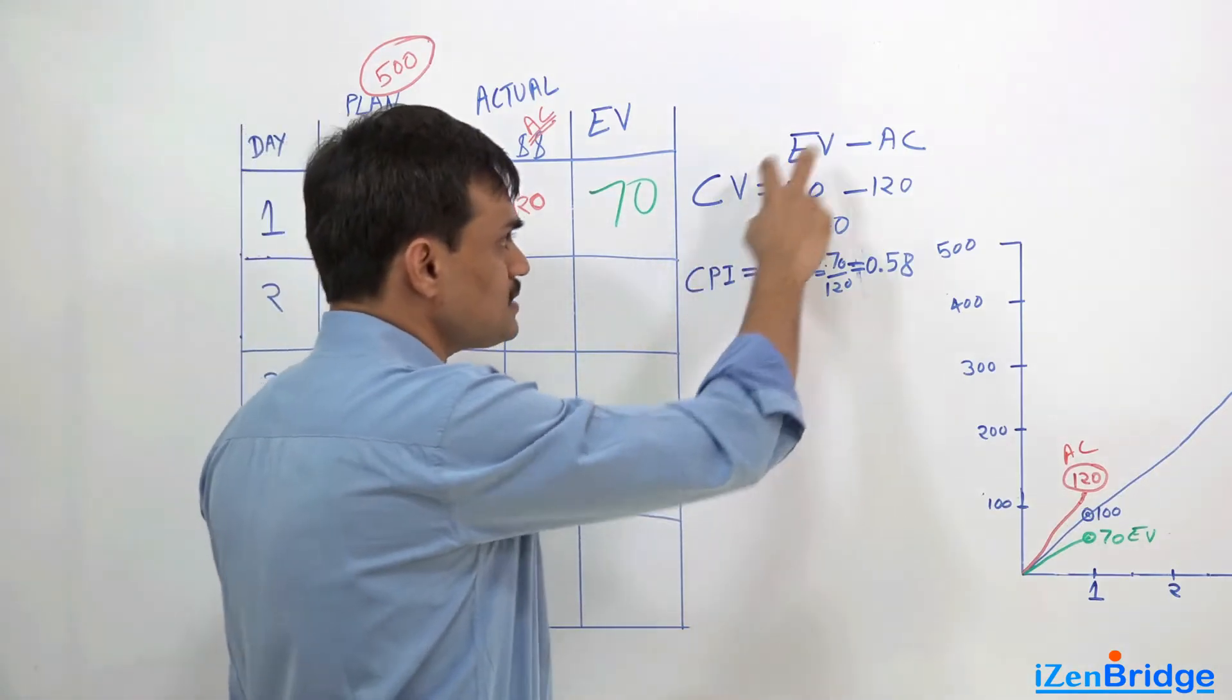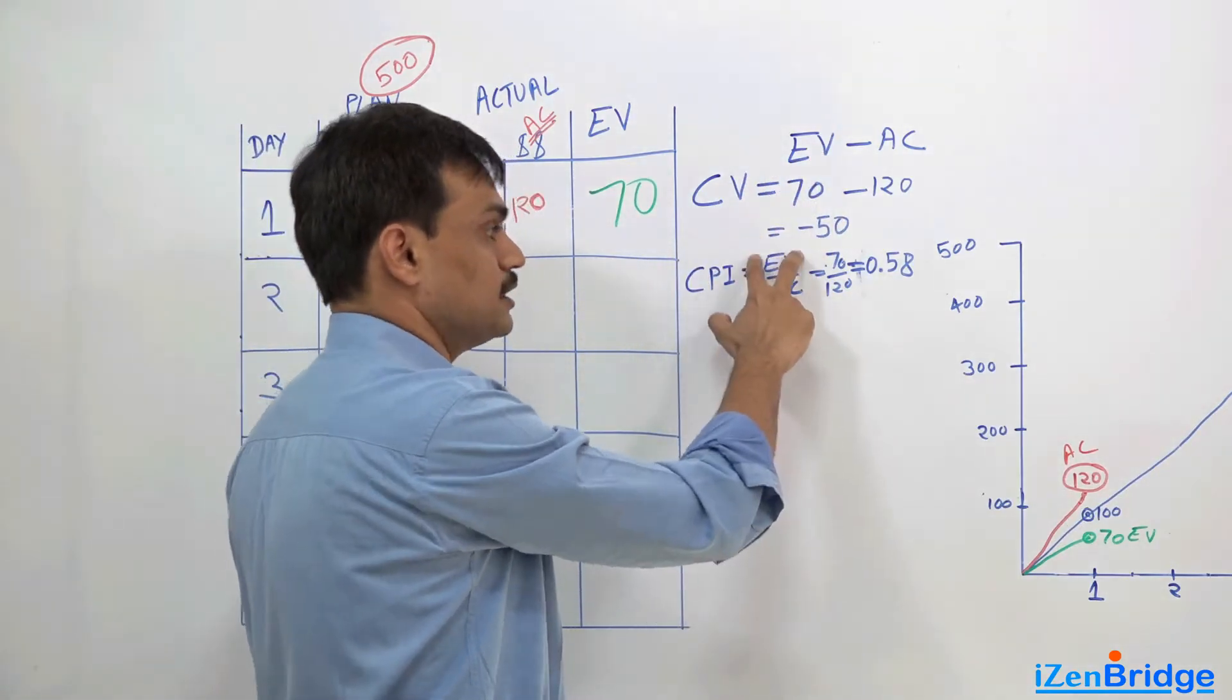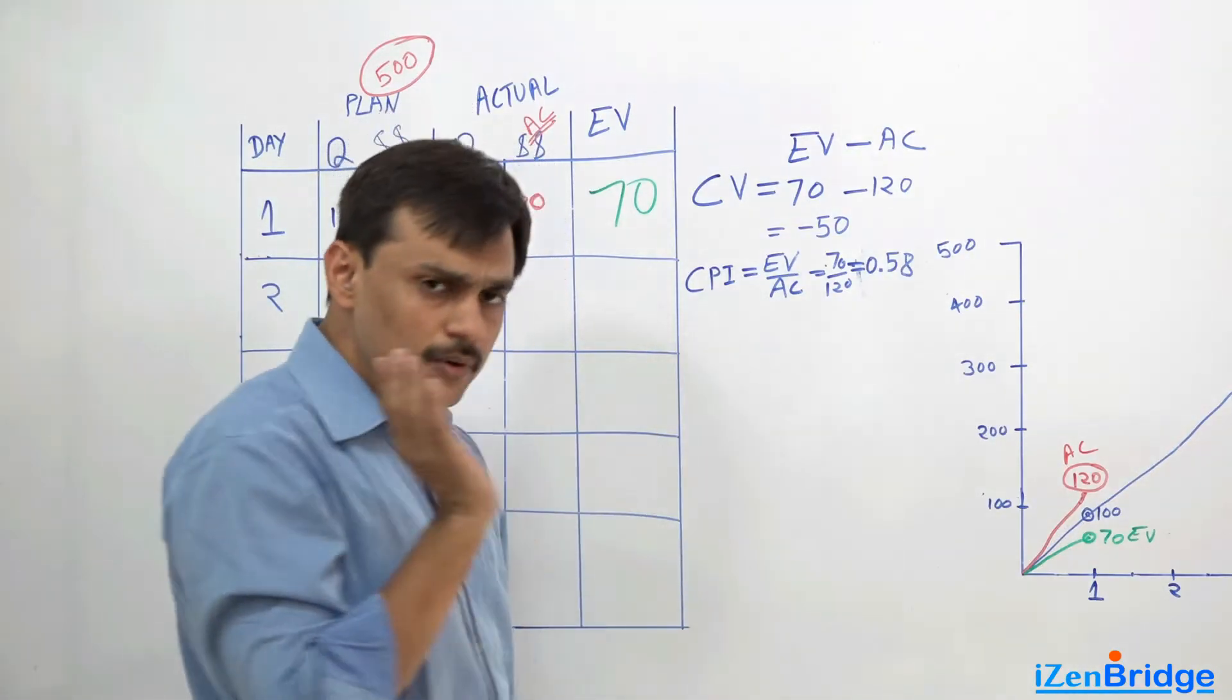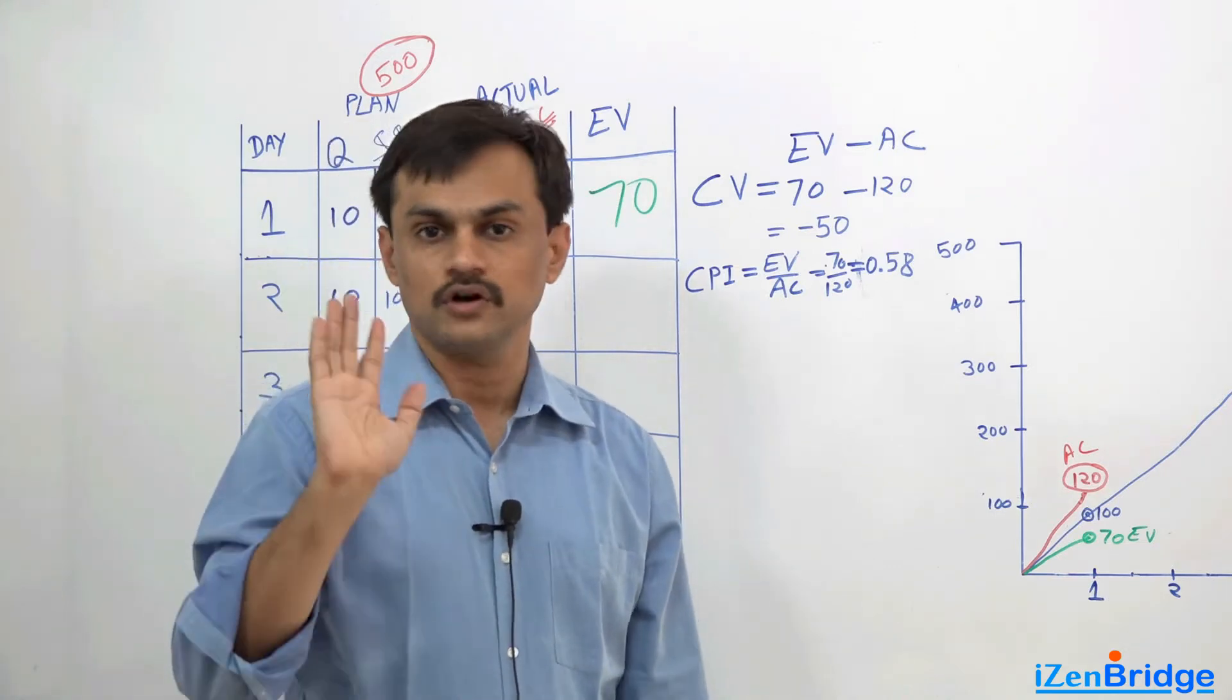So cost variance - earned value. Cost performance index - earned value. Earned value is the source of all the information. Now, if it is about cost, the second figure is actual cost.